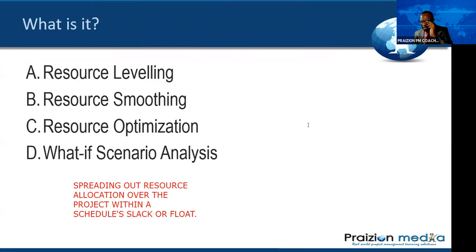So if you read the language here, resource leveling, it says, a technique in which start and finish dates are adjusted based on resource constraints with the goal of balancing the demand for resources with the available supply. Then it says, if you go to the third from the last, resource leveling can often cause the original critical path to change. See that? Available float is used for leveling resources. Consequently, the critical path through the project schedule may change.